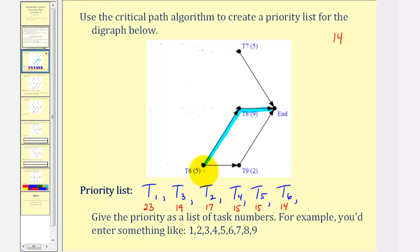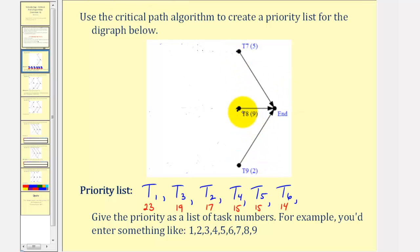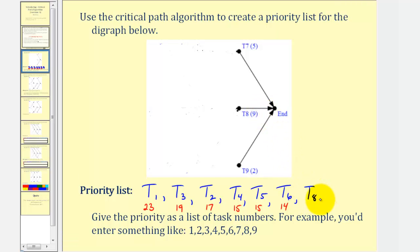Now we eliminate task six from the digraph. From here it's pretty straightforward — task eight takes nine hours, task seven takes five hours, and task nine takes two hours. So the remaining priority list would be task eight, task seven, and task nine, with times of nine, five, and two hours respectively.